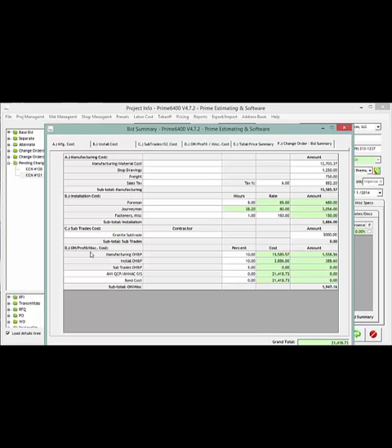And then finally, we've got our last area here, which affects the percentages that have been allocated by the contract document, typically for being added to all the items that we've got listed above here. So our manufacturer and material cost would be 10%. Installation cost, if self-performed, would be 10%. If it's subcontracted or any other subcontractors, would be put in at 5%, which is typical for most projects. But check the contract documents to see what the requirements are.